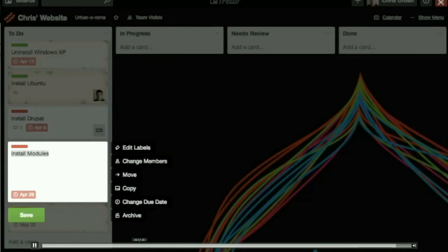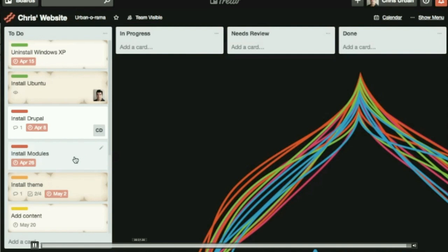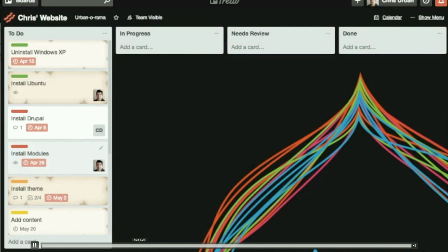So the question for everybody, with multiple teams on multiple projects, I would first start by keeping the projects, the clients at the very least, on separate boards. So Trello will allow you to jump from board to board, and out of the box, it's free, unlimited boards. So you can add as many people as you want, and you have the control of assigning which people to which board. So you can have segmented teams, team A is working on this board for this client, and another board for another client or another project, and you can keep them separated. But there is no cross-pollination of tickets between those two boards. No, correct. No, you can't.